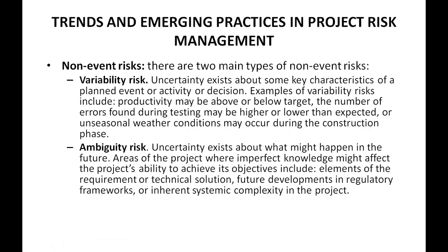Now quickly, let's look at trends and emerging practices in project risk management. Before now, most often what we focus on is event-based risks. So we look at risk occurring from tasks, risk occurring from activities, risk occurring from events that take place within the project. But we've not really paid more attention to non-event-based risks, risks that are occurring because of no particular events, but those risks are coming up.